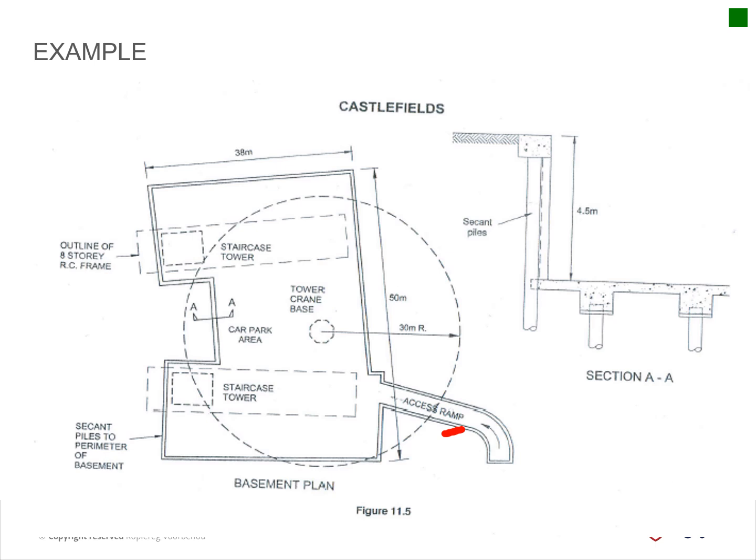So I'm not going to go through the method statement in detail, but you will see you've got your description of the works at the top. That's the one that you've just started, and then you've got your sequence, where prior to excavation works taking place, the following procedures must be carried out, and then you list your details of how to go about it. Then you've got a second section: your resources, your supervision, your labor, your plant. You list all those items that you need to sequence here.